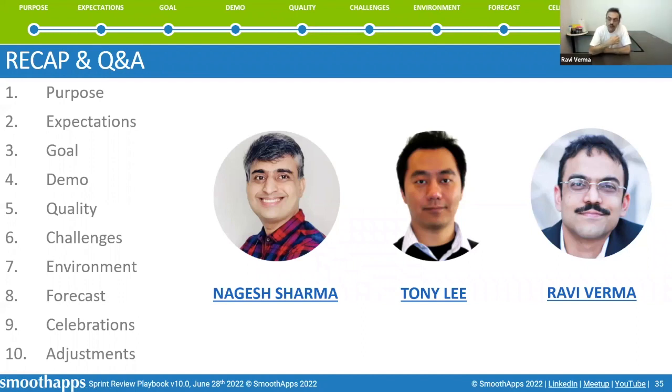And I would say if you are using systems of truth, which are automatically getting updated as you're doing your work, creating or updating your roadmap in preparation for sprint review should not require any special work, because as you're working in Jira or Azure DevOps, the roadmap is getting updated through backlog refinement or sprint planning or the work you're doing. If you are using evidence-based management scoreboards that are plugged into your systems of truth, ideally there's no special preparation to be done before sprint review.